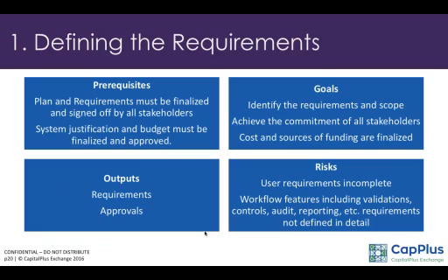The laundry list of functions also indicates that the institution does not really have defined processes and product definitions in mind. In other words, it really does not know what its requirements are. So don't have a laundry list. Try to define your requirements for a period of 3 to 5 years, because the life cycle of this type of system will be 3 to 5 years.